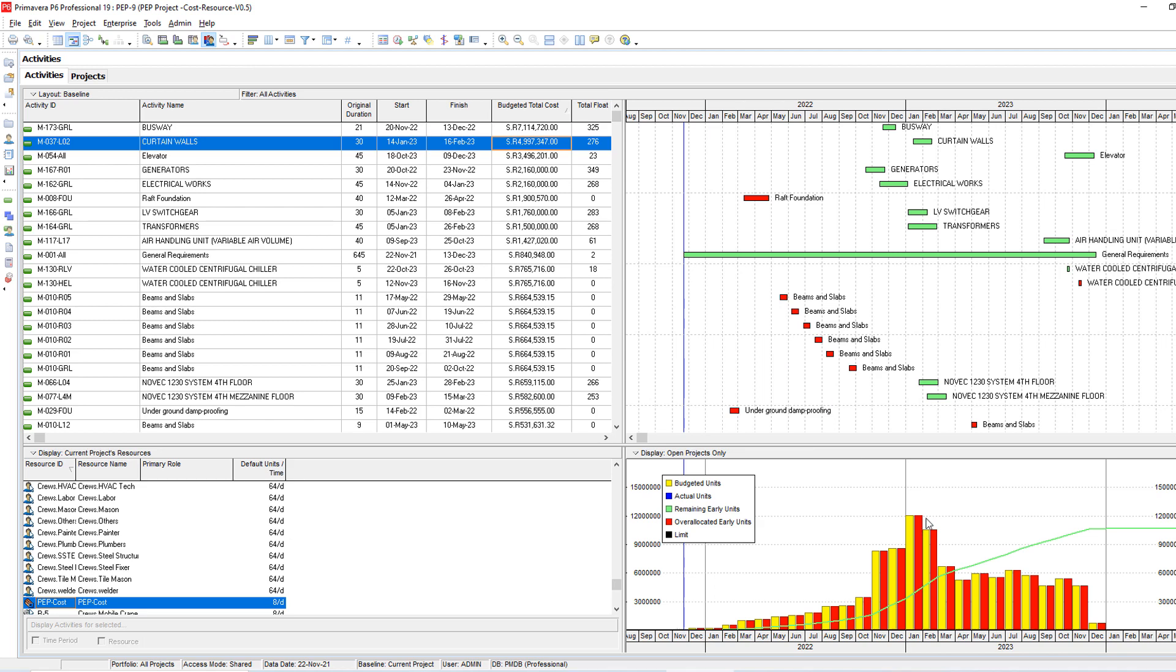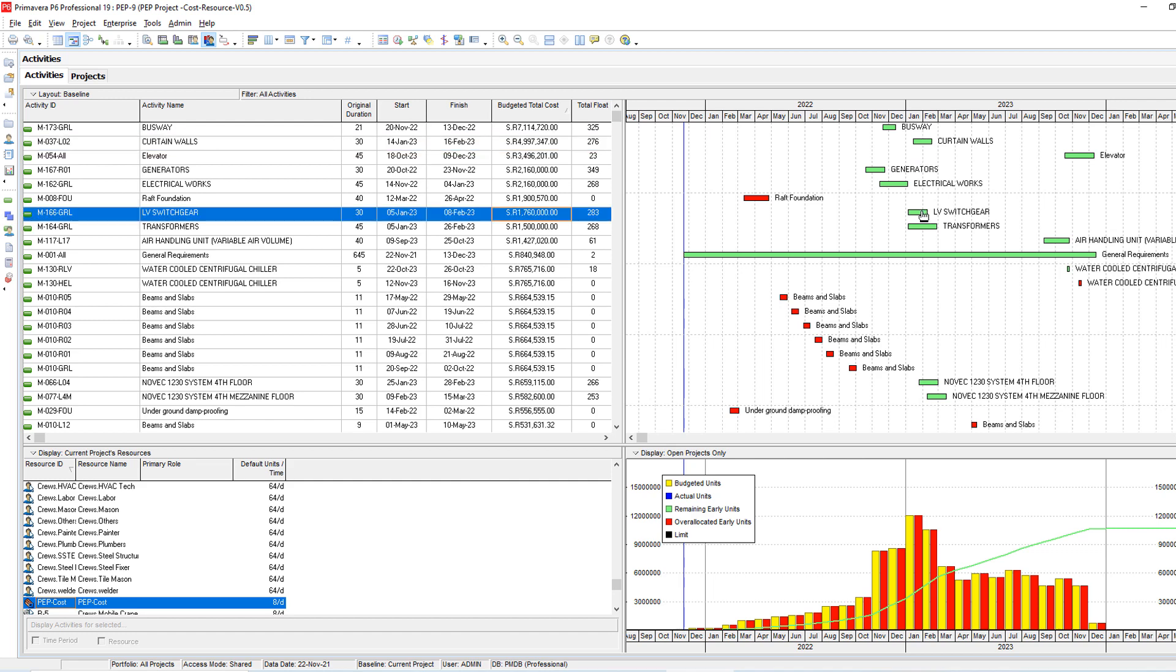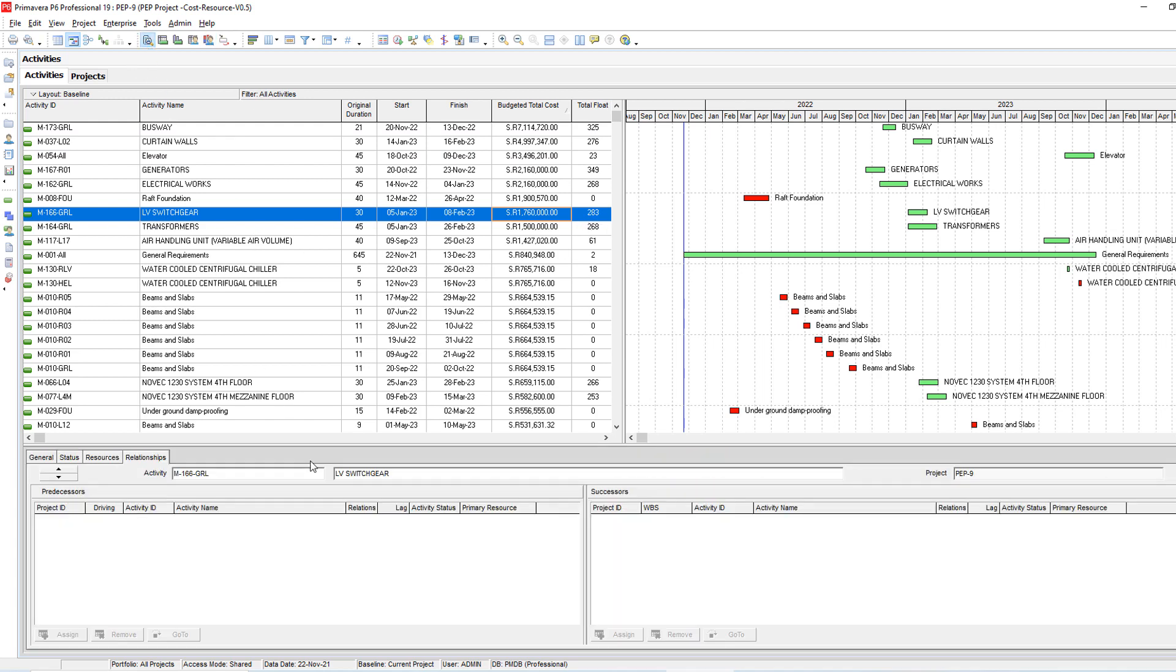January became less also and now February is too much. So this one I fixed. What else can you fix between January and February? I'm going down until I find here this LV switch. I can move it, I have some floats, so I can also move this one. Let's move it by 25 days.